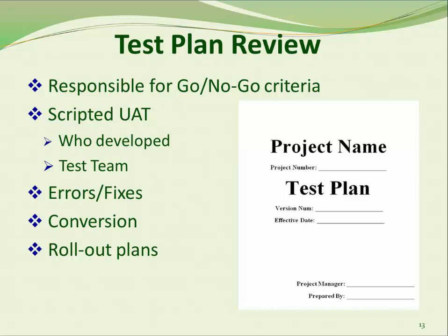When evaluating the plan for system testing, pilot, and implementation, F&S will also consider questions such as the following, if not specified in the state's planning documents. Who has the responsibility for verifying the test results, and what is the sign-off process which will document that the go, no-go criteria have been met? What scenarios are being tested during UAT? Are these scenarios scripted? Who identified these scenarios to be tested and developed the scripts?